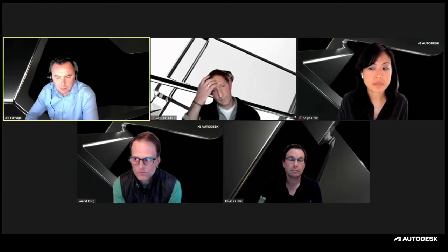Yeah, I think I can answer that. I can certainly give how we've dealt with that. We tend to have a very closed kind of QC check in the WIP space. WIP space is reserved for designers to upload their information. It doesn't go beyond that. The only people that can see it are our document control team. They'll vet it against not only the naming convention, but we've got a fixed set of rules that they have to check as a minimum. And it tends to be basic things like, does the title of the document on the file uploaded match the title that's been typed into the common data environment?